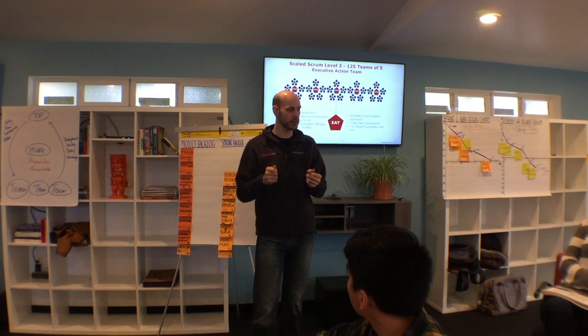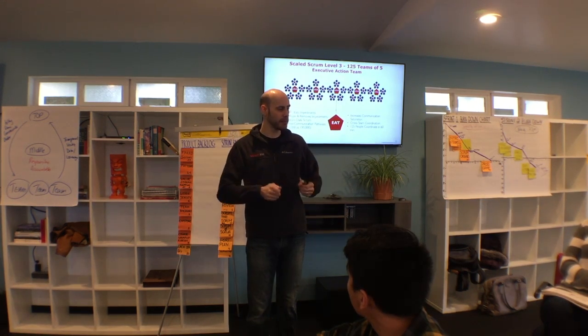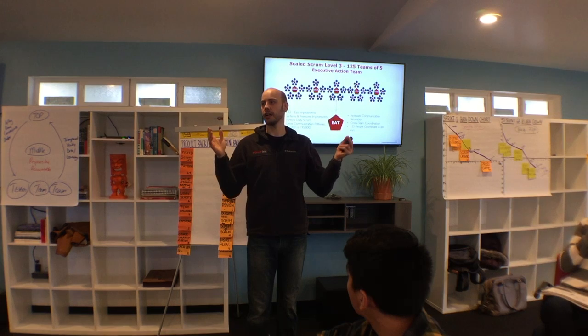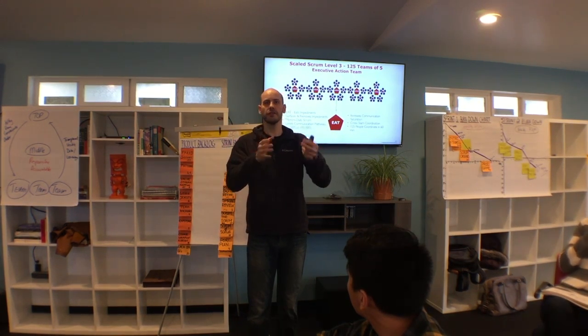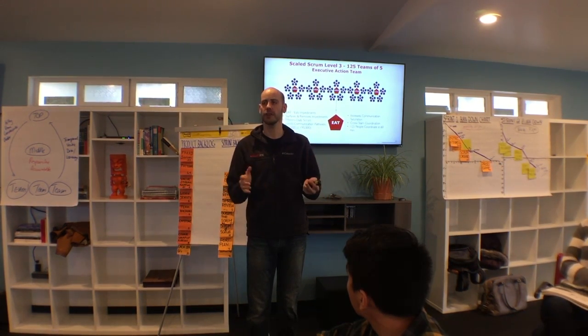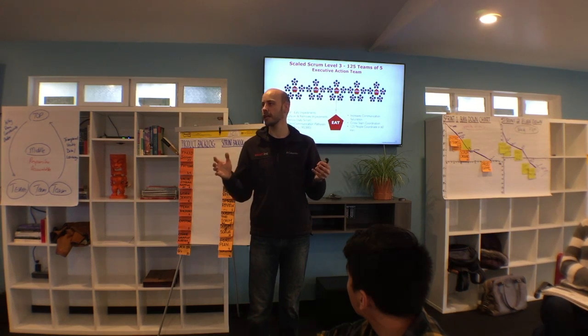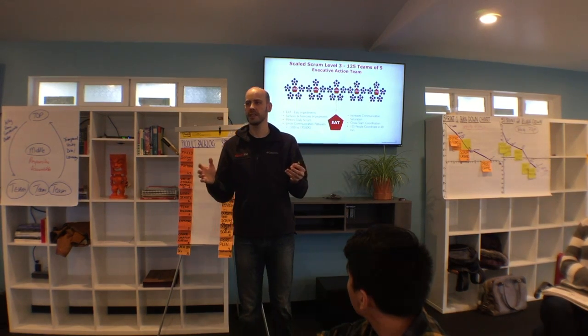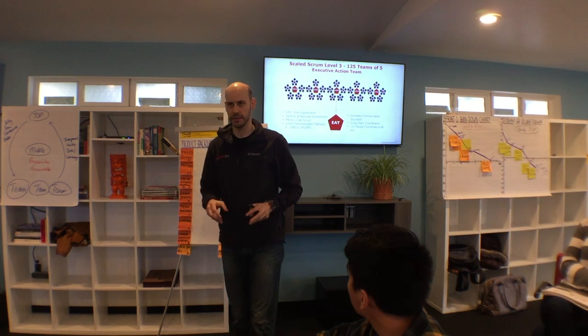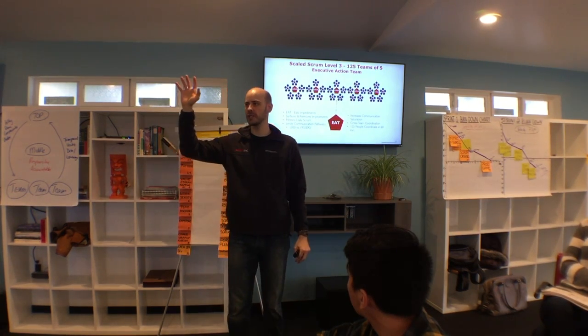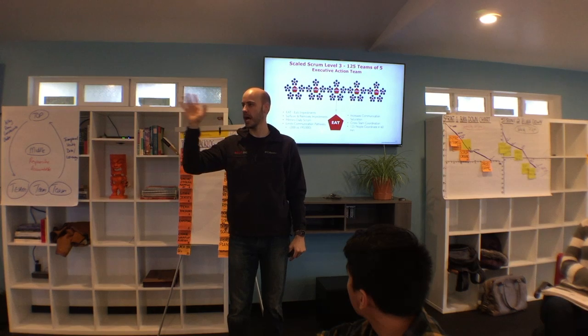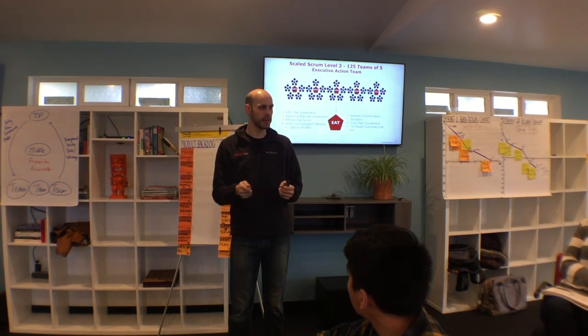If no product owners have room, or if an impediment requires senior sign-off, like changing a vendor. This vendor is not going to meet us on time. We just find that out today, but they're signed into our contract. They're the CFO's cousin, whatever the reason is. We need top-level approval to change vendor, but we will not ship on time if we don't change vendor. That's an impediment that needs to go up.